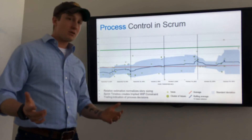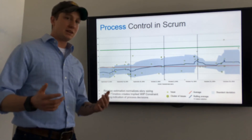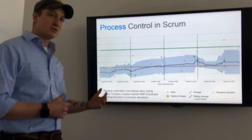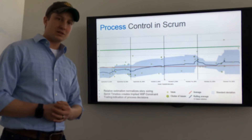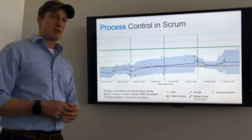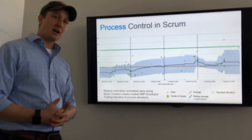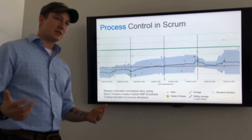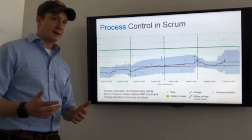In Scrum, you're timeboxing to two to four weeks, so your process is in control as long as your stories are around half the cycle time of a sprint, with the standard deviation of roughly the same amount.